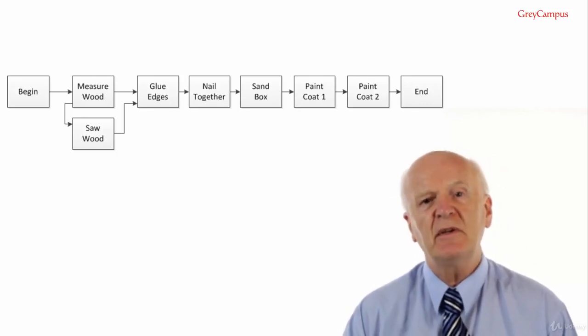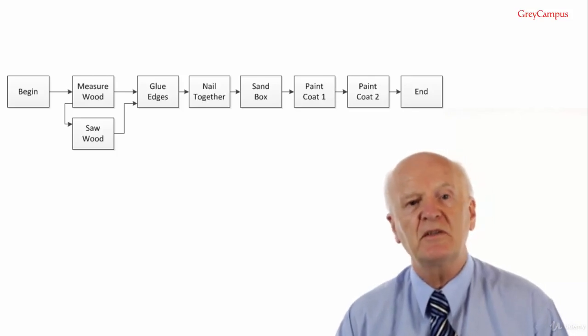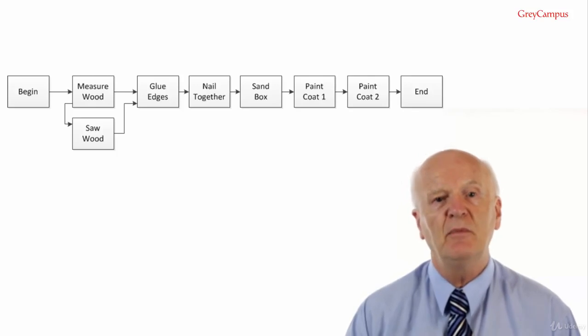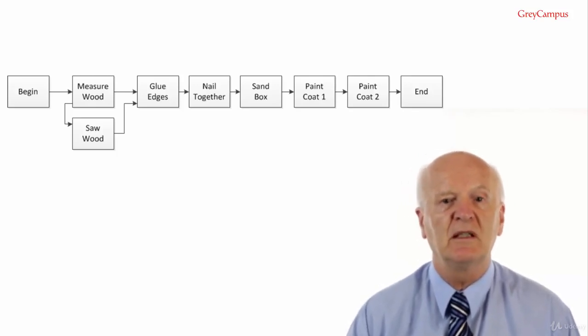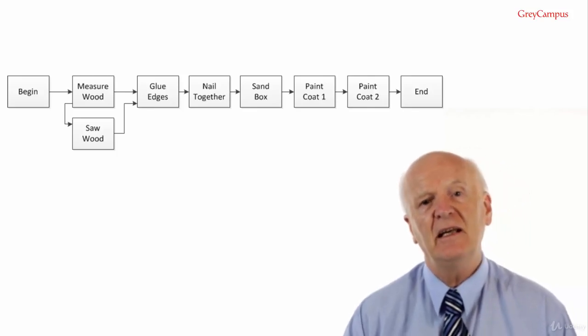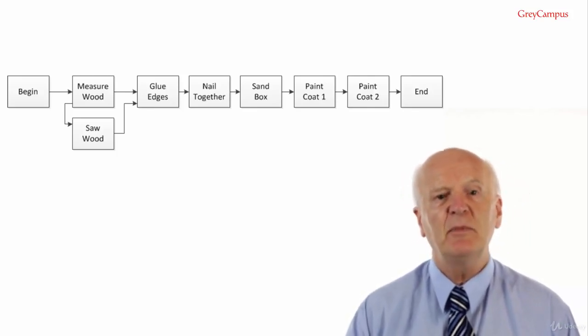For example, generally accepted best practice recommends that during construction, the electrical work should be started and finished before the plumbing work. This order is not mandatory, and both activities can occur in parallel, but performing the activities in sequential order reduces the overall project risk.